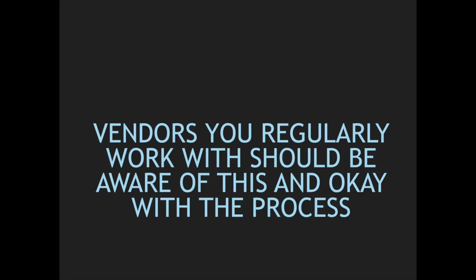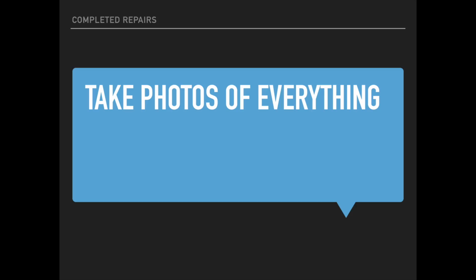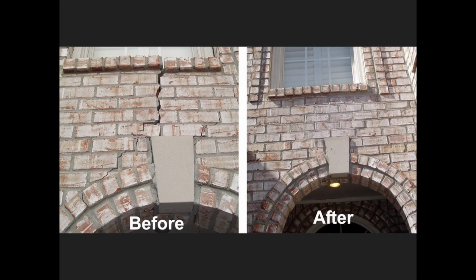Okay? Now, they've completed the repairs, and they should be taking photos of everything while they're doing the work, right? And I'm not saying stop everything and take a selfie, but by all means, if you pull a garbage disposal out, take a picture of that, take a picture of underneath the sink without a garbage disposal, and then take a picture of you putting a garbage disposal in, right? For reimbursement and to get sign off from the asset manager, we need before and after pictures for every repair.